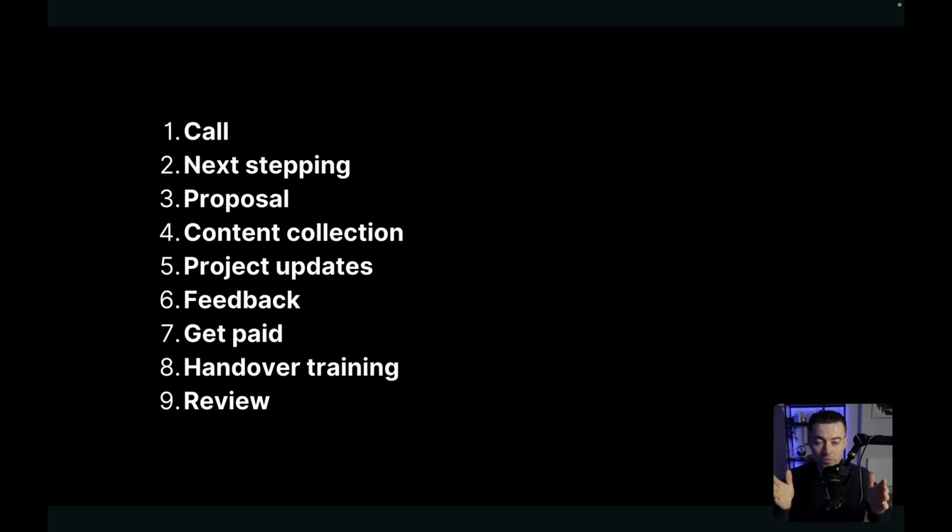So what I do is I say, okay, we do the 50% deposit, I'll do all the work, and then right at the end, before we do handover training and I get you on the site and hand over the actual ownership of the website, you need to pay that second 50%. Once you've sent that invoice, they've paid it, it's all good.